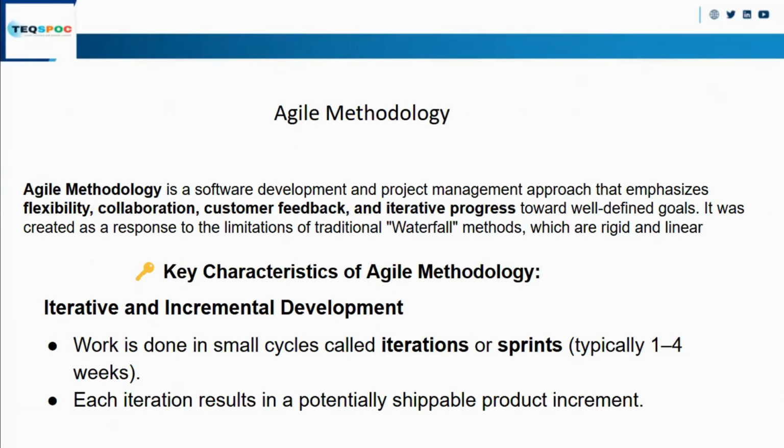So what happened in waterfall? When the whole development process is completed, only then does the testing start. If in testing we find a bug, then again we jump back into development, and when development is completed, we do the testing again. So it is basically time consuming, and a large documentation process was involved in the waterfall process.